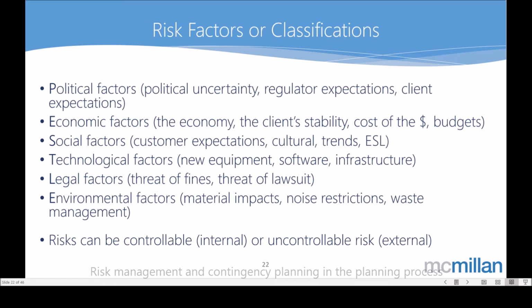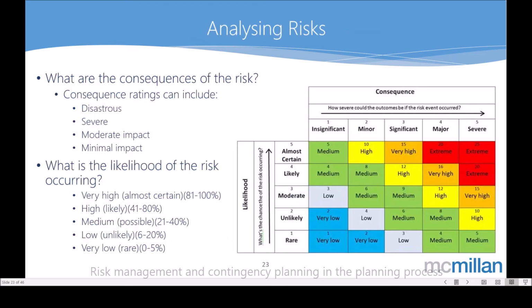So with my simple plan earlier, where we're just doing training for a procedure, we may not need to go through this depth of risk assessment, because we might think about the risks as we're actually doing our simple plan. We think, okay, what if staff are absent? So we might build that into the timing. We go, okay, there's probably going to be some absenteeism. So instead of trying to get all this training done in a month, let's stretch it out to 6 weeks, and we build in the capacity to deal with some of these risks, because we only see them as low risks and so forth. So you may not necessarily need to go to this degree.